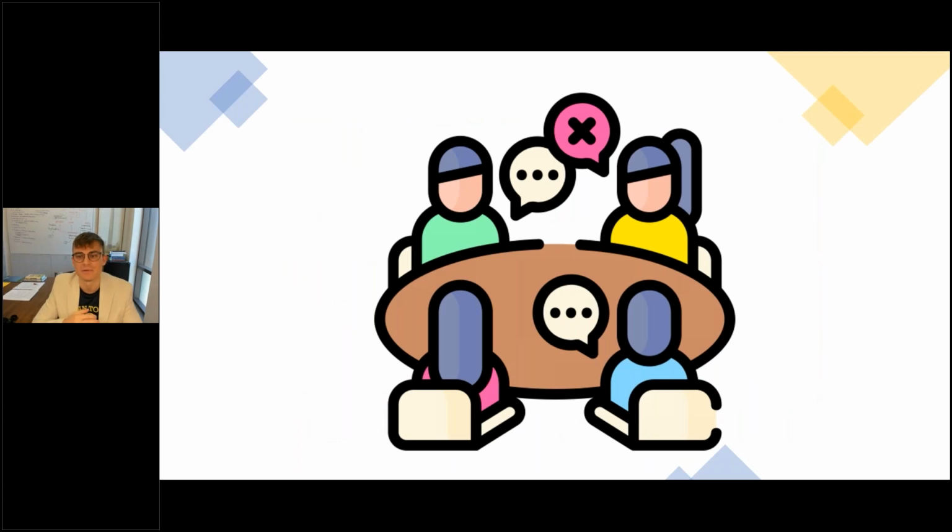Include as many people in this upfront discussion as possible. One group might need perfectly normalized components while another needs to know if something's out of plumb. Ask who will be using this data and think through the needs of the people downstream. The more people you can bring on as stakeholders, the more people can share the costs of scanning and modeling. Through this communication, you'll understand the needs of the client. Then you can use your expertise to define project specifications. Make sure everything is spelled out in the contract so there are no misunderstandings.